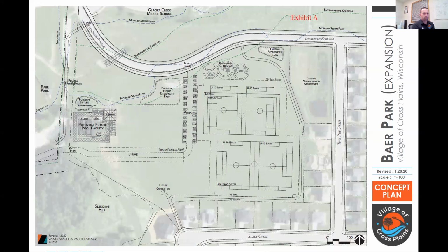This is probably our fourth concept plan. And just to keep in mind, the concept isn't done like an actual parks plan. So in the future, if we look to develop or add some high cost options within here, like field development or even the pool, there'd have to be some type of feasibility study regarding the cost prior to this.